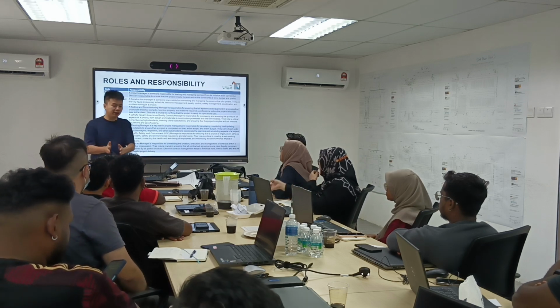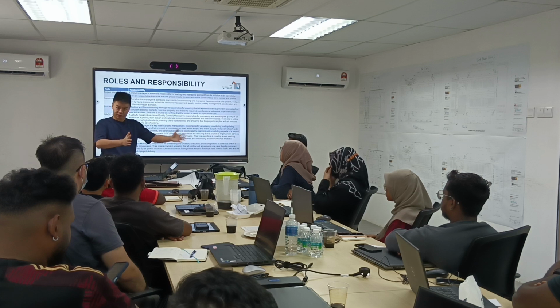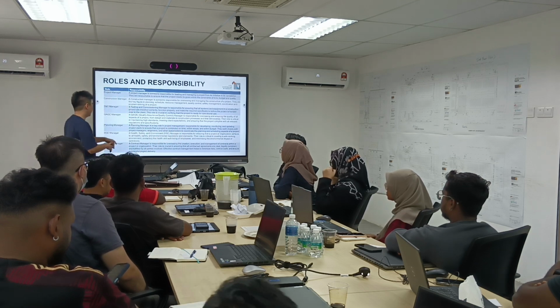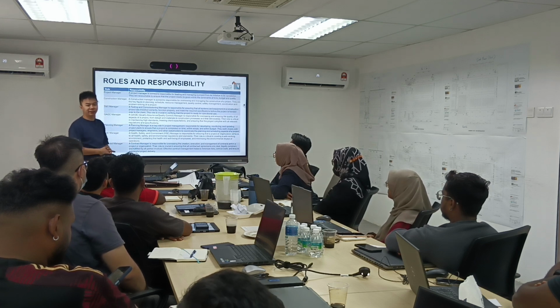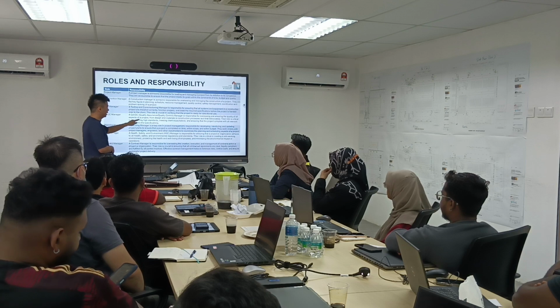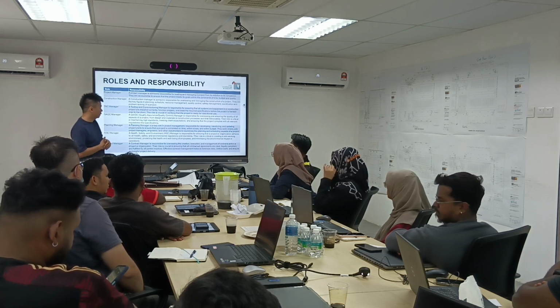We should try our best to finish the construction early, then give ourselves time to turn on all the systems and test them. But of course, if the situation does not allow, then Kelvin will become a chaser. He keeps on chasing after everyone. Okay, QA/QC managers. In a construction project, QA/QC managers, right?